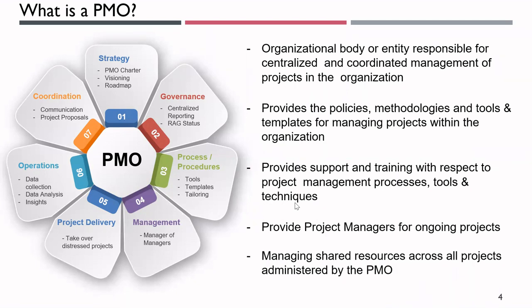So the first and foremost important thing is that every PMO should have a charter, and that is where I talked about the executive sponsorship coming in. The charter would have a long-term vision, a short-term vision, and a medium-term vision. Typically, we have 30, 60, 90 planning also, as a part of PMO chartering, or it could also be plans like quarterly plans. I'm talking about this example of this particular PMO in 2009. We did not have OKRs. OKRs, objectives and key results, have become popular now, but at that point in time, we did not have OKRs.